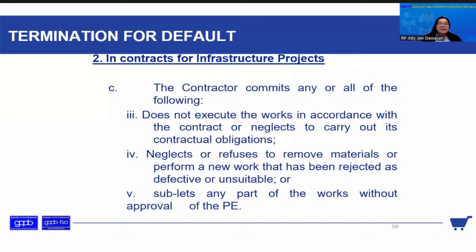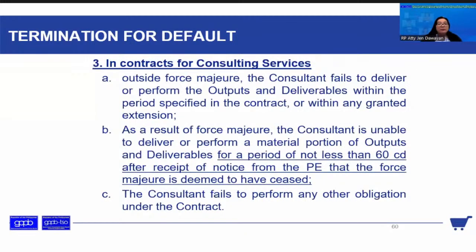For consulting services naman, outside of force majeure, so no force majeure under normal conditions, he fails to deliver the outputs within the contract period. For example, it should be within 60 days, but he did not comply because of his fault.